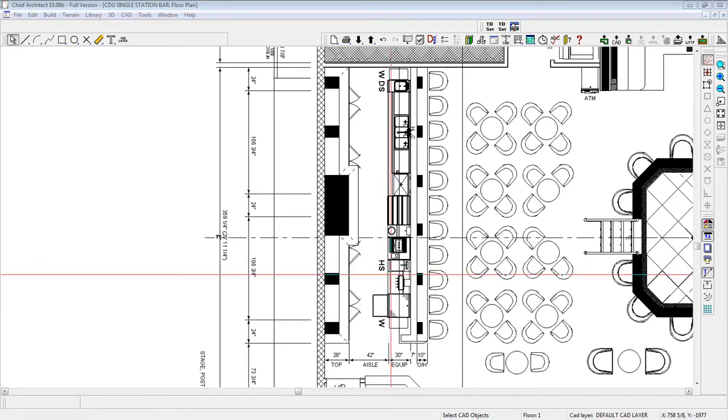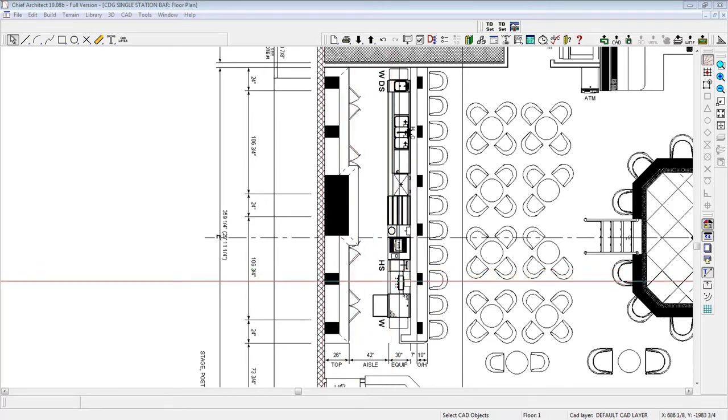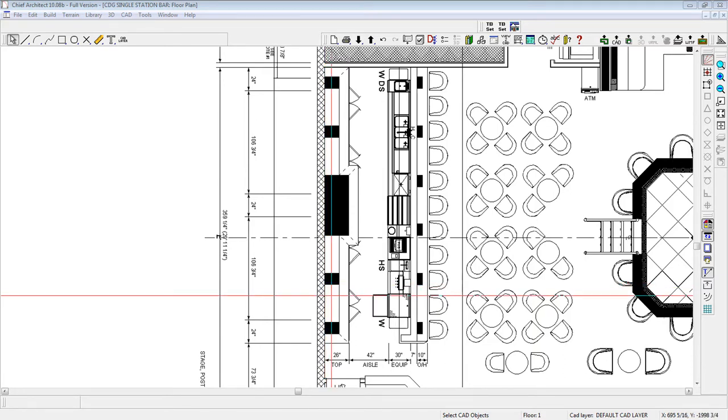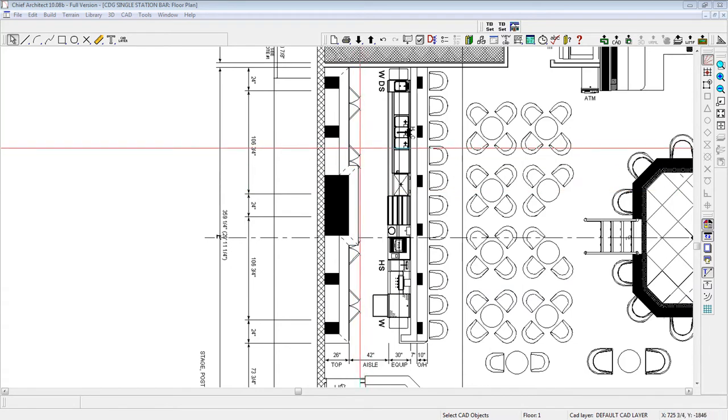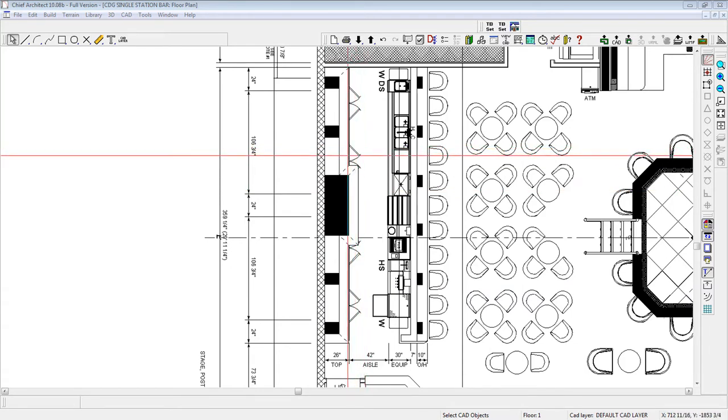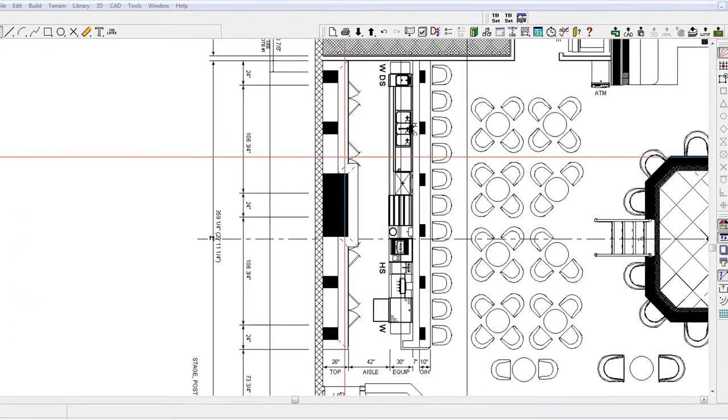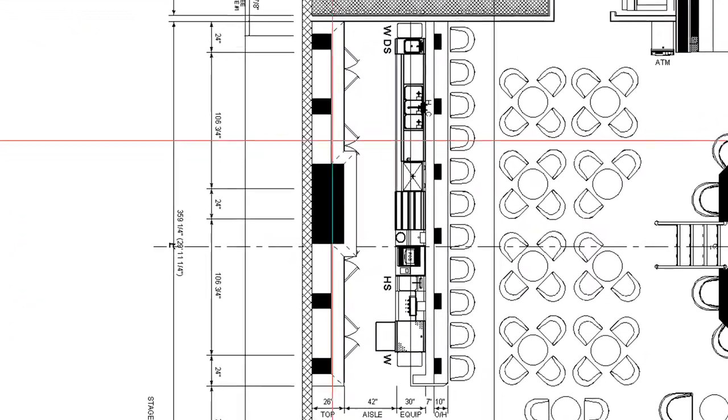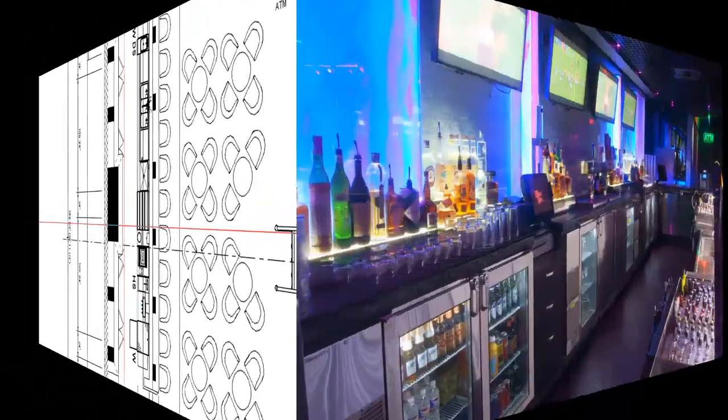But remember, this represents the necessary capital to purchase only a single bartender station and there are additional equipment costs that need to be included. To further extrapolate, let's say that we're going to add four beer bottle coolers at $2,600 each. For clarification, I'm pricing the Glass Tender BB60 stainless steel coolers with glass doors as shown here in this photo.